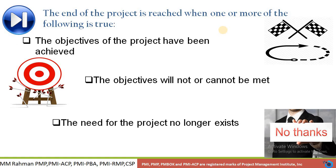Another reason is that the need of the project no longer exists. For example, suppose an organization is going to initiate a project for a product, but during construction we find that a competitor has already launched the same product in the market. So we may stop the project because the need is no more required.